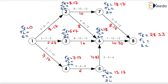For event 8, the TL value is taken equal to TE, that is 28.33, and the slack will be equals to 0 because it is the difference of TL and TE. The TL value for event 7 will be equals to 28.33 minus 8.17, which equals 20.16; subtracting TL and TE gives a slack of 1.99. Also, 20.16 minus 10 equals 10.16. We can find the TL for event 6: it will be equals to 28.33 minus 10.33, so it will be equals to 18 and the slack will be equals to 0.